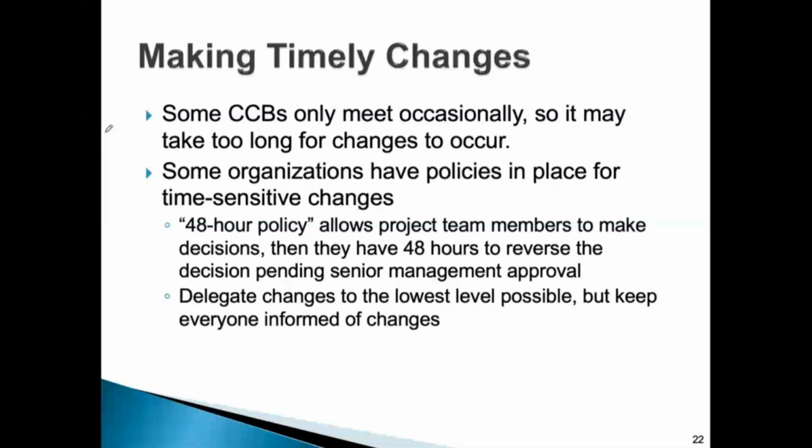What happens is that the project manager, in these very strict and sensitive situations, can make the decisions without going back to the CCB, but within 48 hours he has to report the decision to senior management for approval. So you do the changes, but you are required by the policy of the organization that within 48 hours, you need to show the top management what these changes are and get them approved.